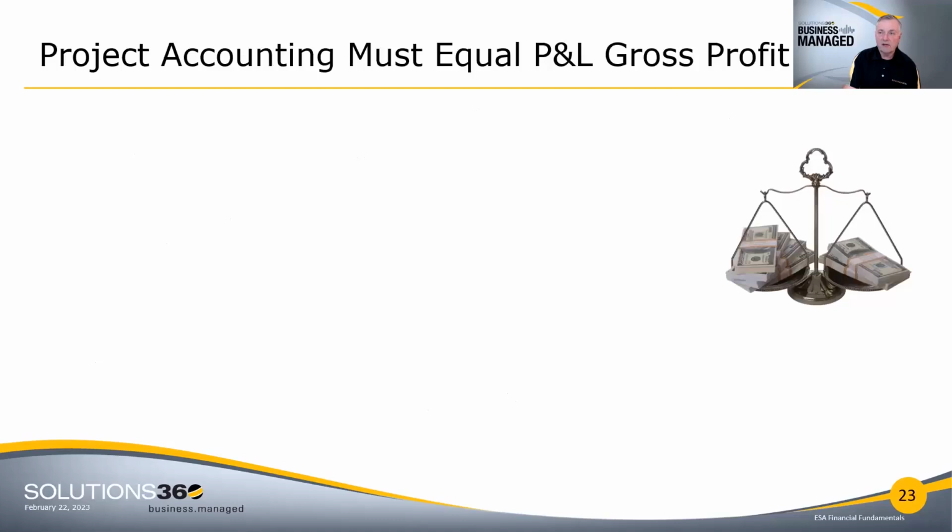The last thing I want to cover is that I can show great project profitability, but if my projects don't consume all of the pool of labor and equipment that I've allocated, then it won't equal what I'm showing on my financial statements.